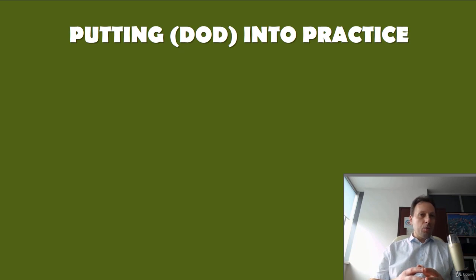Whether it's a large user story with multiple dependencies or a tiny bug fix, the person doing the work is expected to run through your definition of done checklist. That does not mean that everything on your checklist has to be ticked off for every work item. A tiny technical improvement is unlikely to need a marketing email written about it, for example. It does mean that everything in the checklist must be considered for every work item. You should trust your developers to use their judgment.